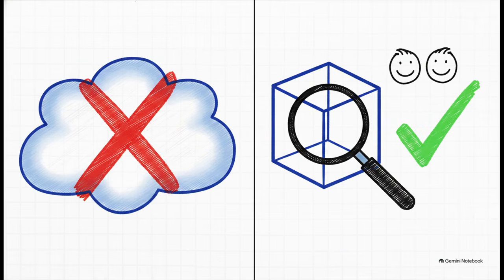Then, we get to the acceptance criteria. And the crucial point here is that vague statements are outright banned. You cannot write "works correctly" or "handles errors gracefully." No way. Every single line has to be an observable, testable contract. For example, a proper criterion would be something like, a 2 GB upload resumes after a network interruption without resending completed parts. 2 people can look at a running system and instantly agree if that is true or false.